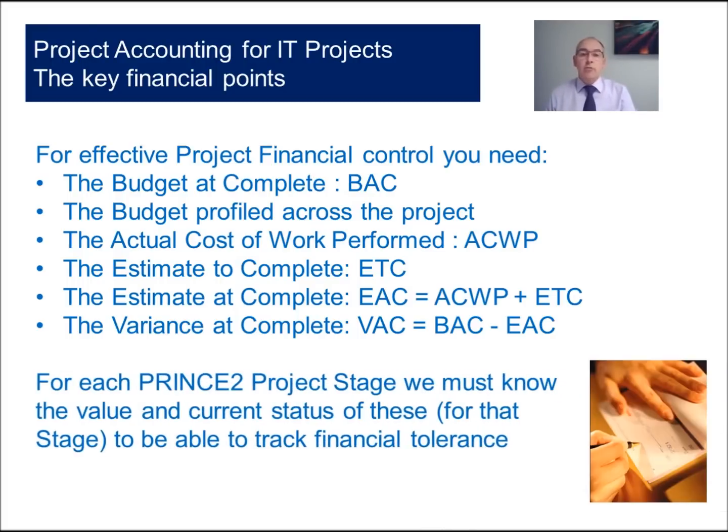So for each PRINCE2 stage, we must know the value and current status of these, because without them we can't track tolerance, and we don't know if we're out of tolerance and have to go back to the project board.